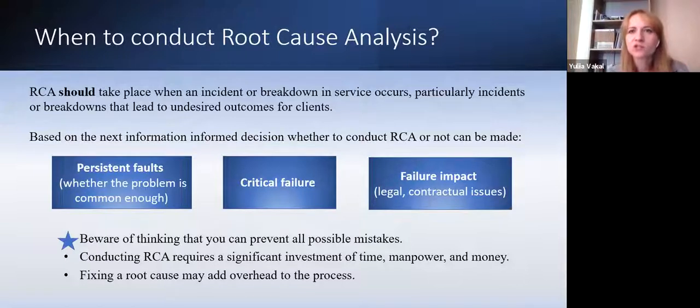Okay, so next question, could you please advise when it's better to conduct the root cause analysis for agile projects? At the end of the sprint, more often, right? In agile, it's time. So it should be set up in your organization. I would say do it regularly, end of sprint. Definitely no more often than once in a sprint. I would probably say maybe every 1 to 4 sprints, depending on how long your sprint lasts, 2 weeks, 1 month.